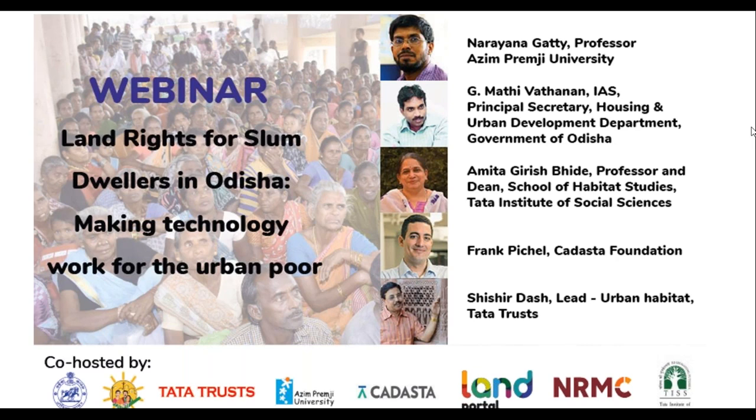I would say WhatsApp has played a very important role in the management and execution of the project. We have about 32 groups, from the implementation group to the core group to the groups in the districts. In the implementation group, everyone from the district collector to the principal secretary, the joint secretary, the director of municipality administration, the technical agencies, and the civil society organizations are part of the group. The chain of command of the project management is being accelerated because of these WhatsApp groups.